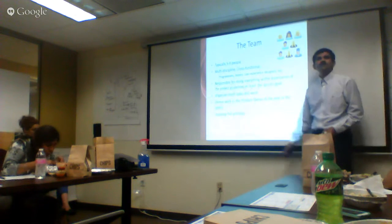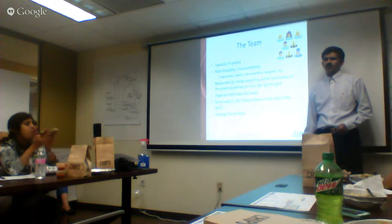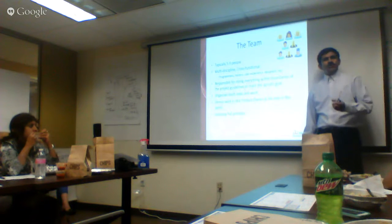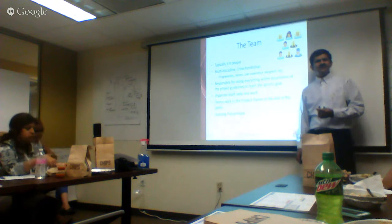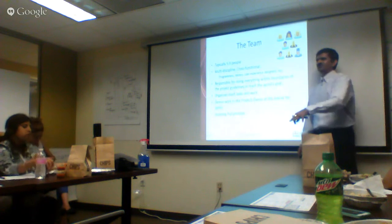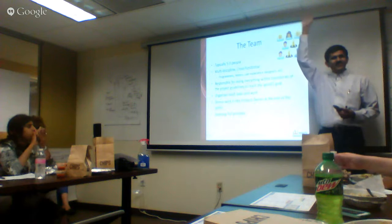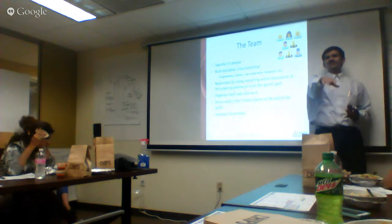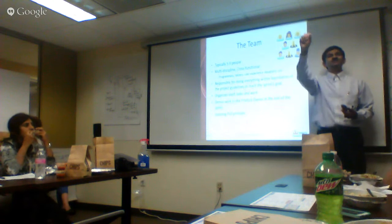And applying the pull principle. Pull principle means what? Have you heard of the pull principle earlier? We just said the project manager defines the work breakdown structure in a traditional project. He assigns the work, pushes the work. Here, they pull the work. I commit to this. Okay, I'll do this. You don't worry about it, I'll take care of this. I pull the work from the product backlog, from the sprint backlog.